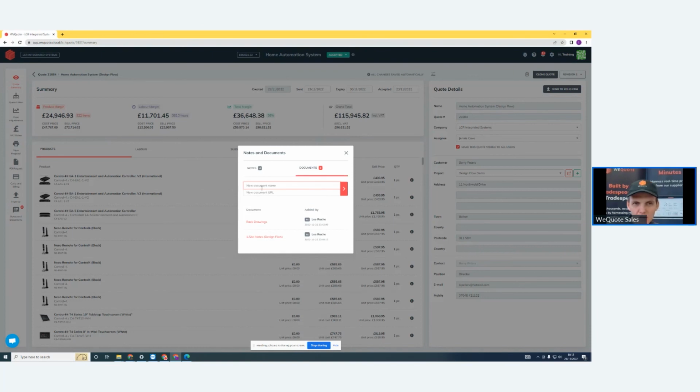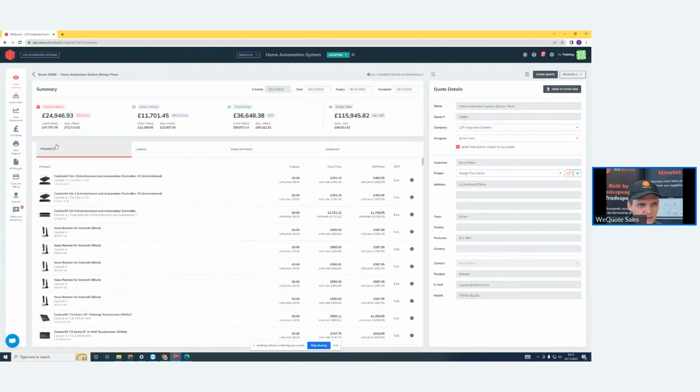One thing to be mindful of with the packages, you only get one revision, which caught me out. So just make sure you try and iron out all the changes and get your draft set of drawings done, and make sure you sit down with the client, make sure it's done properly, and then get your version 1 out there. Any tweaks, hold off and add them to that one revision, because otherwise you'll end up paying more.